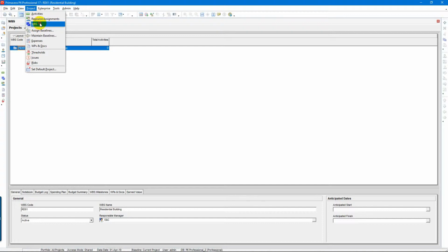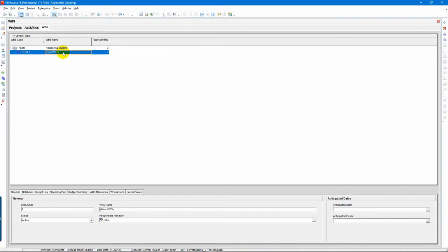So click on the icon and then we move to the WBS, and then we need to create the work breakdown structure in this part. To create it, we just move the cursor to the right-hand side and see the icon. Just click on Add, and in this part I divide into two main parts. The first is the underground structure and the second is the superstructure. So I divide in two.